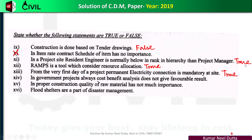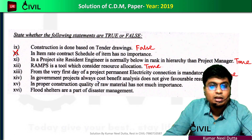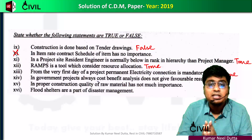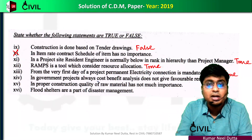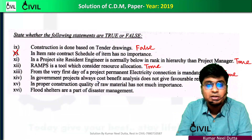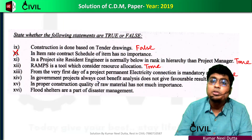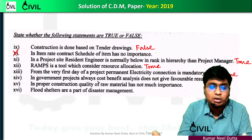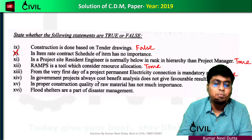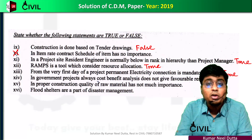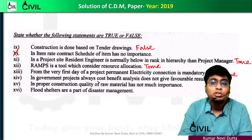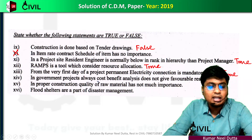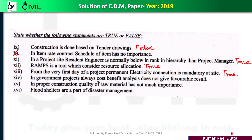Question 14: in government projects, cost-benefit analysis does not always give favorable results. Government projects are sometimes done for social welfare rather than purely for profit. So sometimes cost-benefit analysis may not show favorable results in a business sense, but the social benefit justifies the investment. This is a complex choice between business returns and societal welfare.